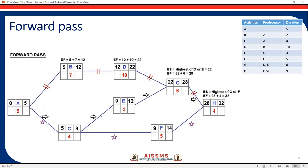Activity C acts as a predecessor for two activities: activity E and activity F. We'll calculate the early start and early finish for both. For E and F, the early start will be the early finish of the predecessor, which is nine. So early start for both E and F is nine. Early finish for E: nine plus three equals twelve. Early finish for F: nine plus five equals fourteen.